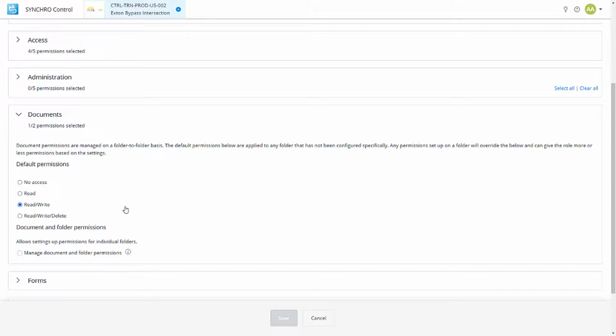And the benefit of that is that here you have the default permissions, which for the most part can give you the ability to give access to specifications, design drawings, safety instructions, things that most users on the project would need, but further restrict specific things like contract information or details on payroll that you don't want to expose. And that means you can set those specific folders on no access or read only, however you want to set that up for those specific roles.